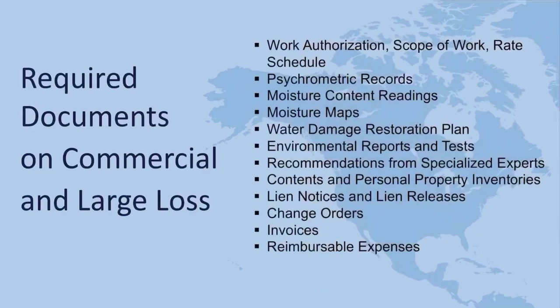Example would be Ohio. If you're working for a municipality or a public entity, your change order's got to be a separate document signed by all parties before any work is performed that has to do with that change order. In most other states, you can simply do a change order over email and get an approval on it and go on down the road. There's weird laws in a lot of weird states, and different laws maybe is a more proper way of putting it, but you got to know the rules of the game. If you're traveling, that's where that legal team comes in, that you can find out stuff like that.